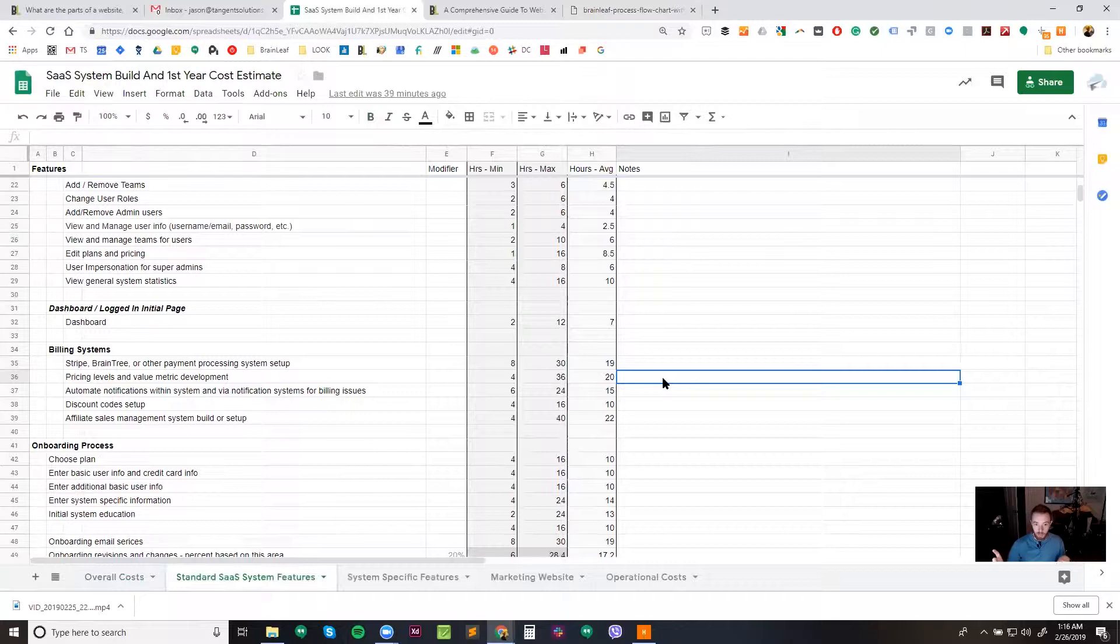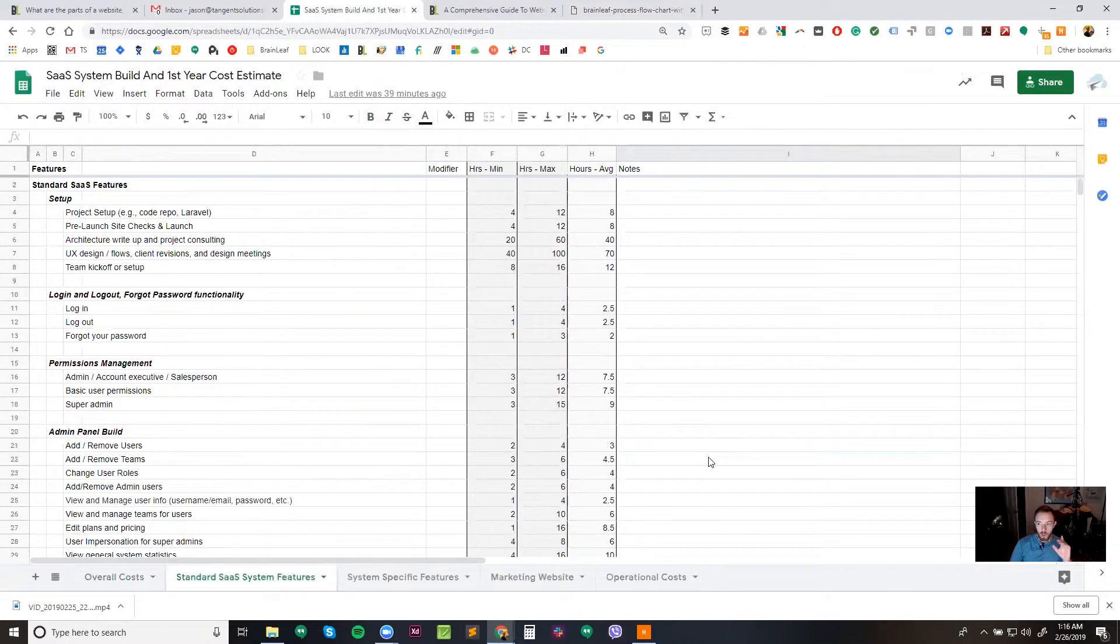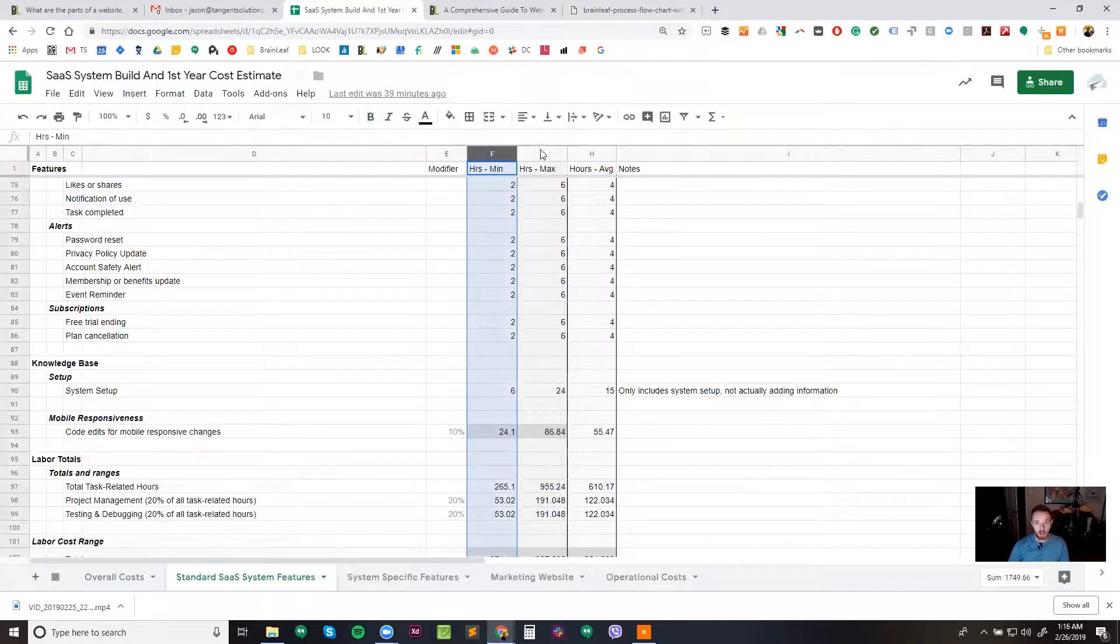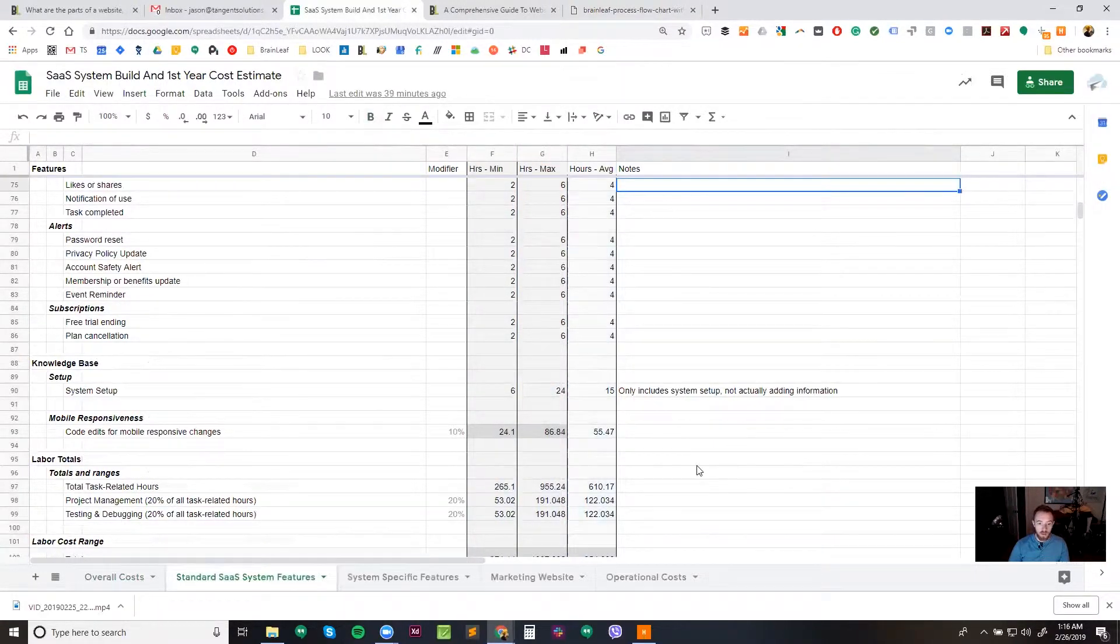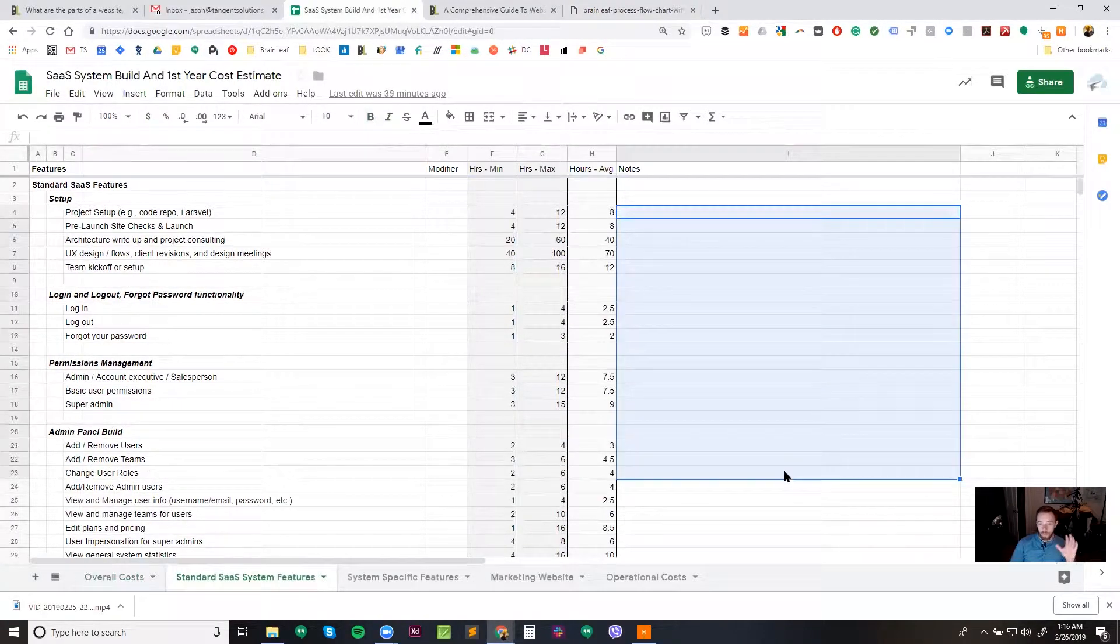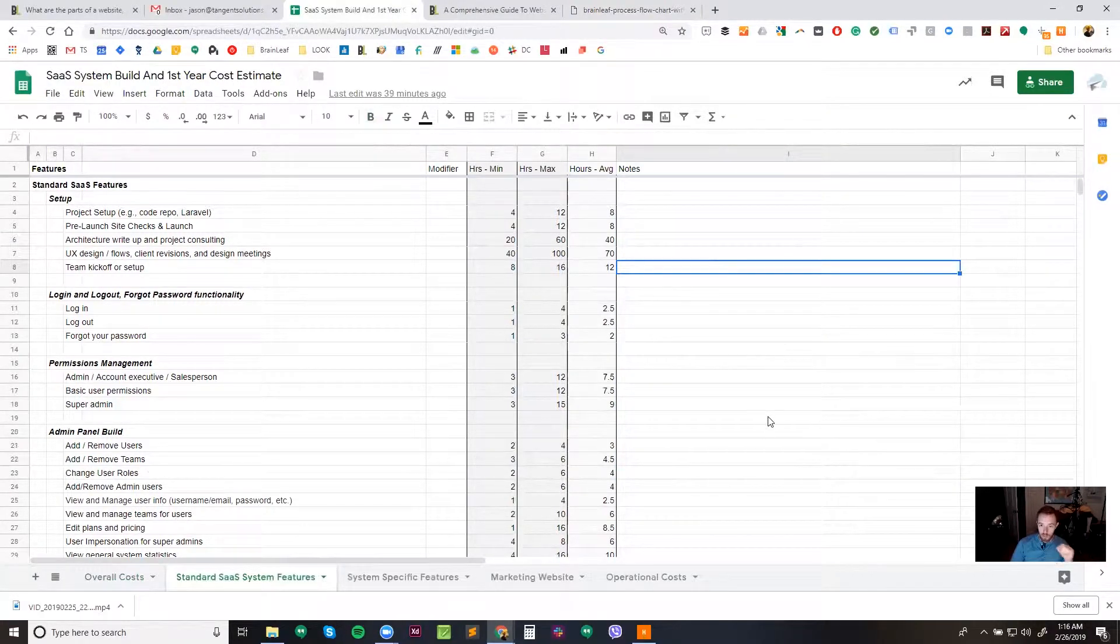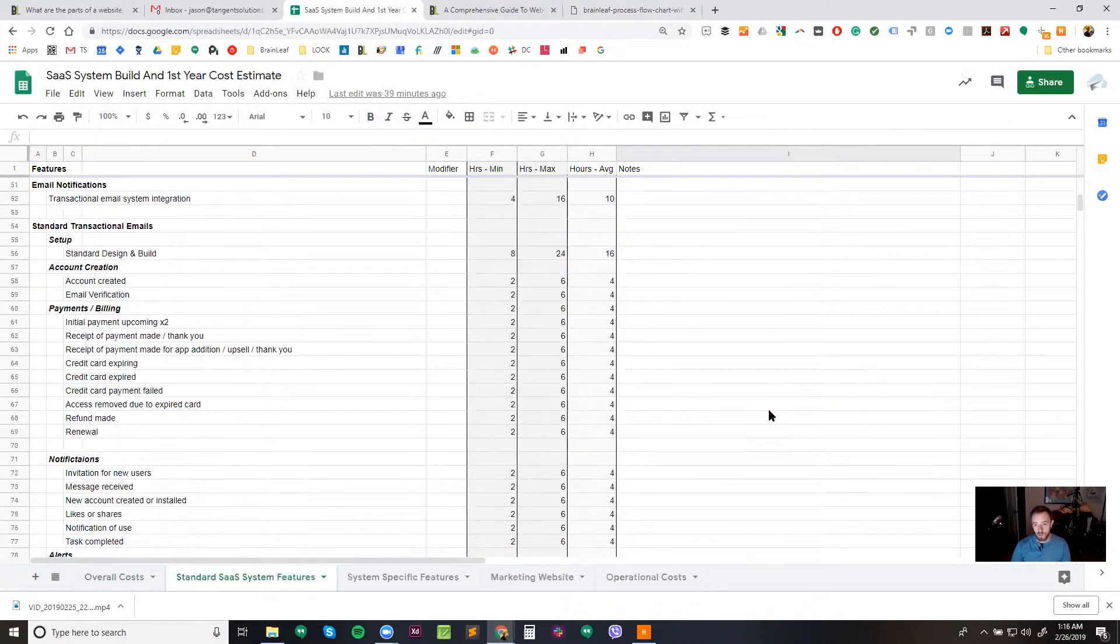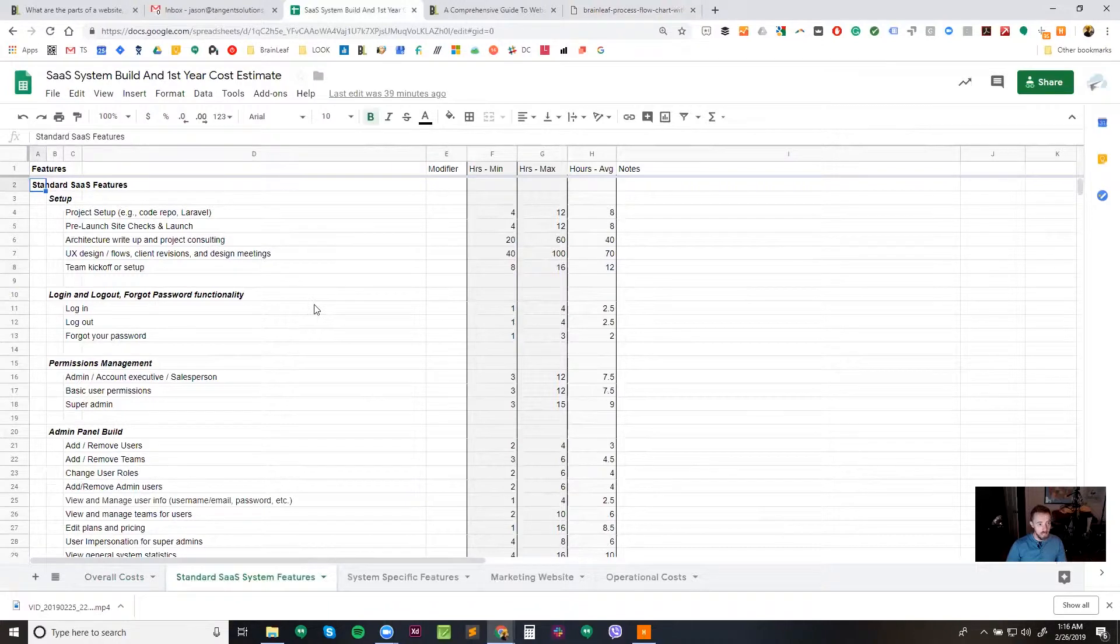And they come back and then we work through every single line in this entire thing with the client before we get to a final price. So coming back down here, we've got our hours min, our hours max, our average, our notes. And also one of the things on the notes here, these notes are, by the time we get done, we usually have a note on every single line. It really takes a while to write all those notes out, but it's so valuable to have. So this, as you can see, is just our standard SaaS features worksheet.